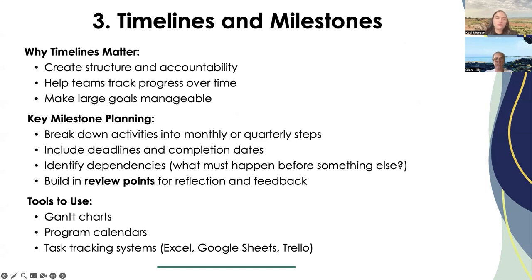One of the key things around milestone planning is you really want to break down your activities into monthly or quarterly steps, include deadlines and completion dates, and think about what needs to happen first before the next task can be completed. And that's what we call dependencies.